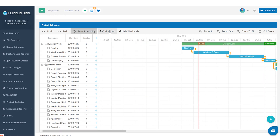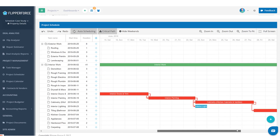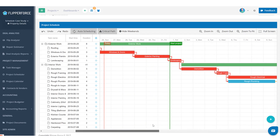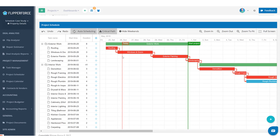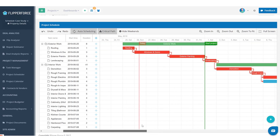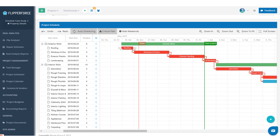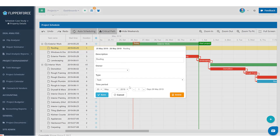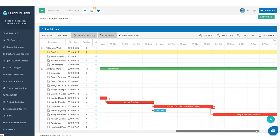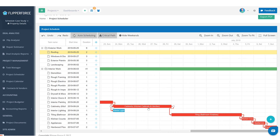Another thing you can do is enable critical path, which identifies the critical items on your schedule that influence the completion date. Since we're doing everything back to back, every single task is critical — if roofing gets delayed by one day, it delays the completion date by one day. For example, if we change the roofing duration to two days, you can see everything else automatically shifts back, moving our completion date from 49 to 50 days.